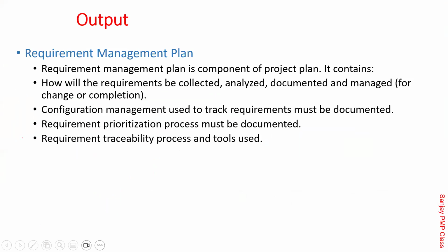Strategy and requirement management plan. This is again a strategy for the requirements. How will the requirements be collected? Will you do interviews? Will you do questionnaires and surveys? Will you read some documents and capture it? Will you take the requirements from a similar prior product, document them together, and then change them on an exception basis? How are you going to do that? How are you going to analyze this?